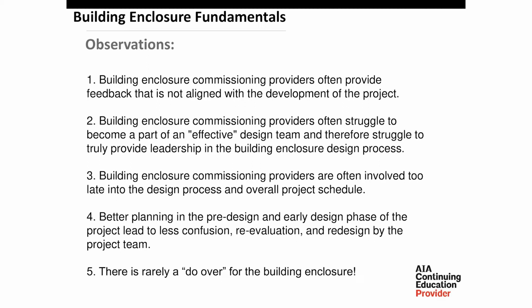Number 4: better planning in the pre-design and early design phase of the project leads to less confusion, reevaluation, and redesign by the project team. This is exactly what I just said a minute ago. It's that redo over and over again where you're not involved at a time that you should have been, and you're not giving the feedback that you should have been at that phase.